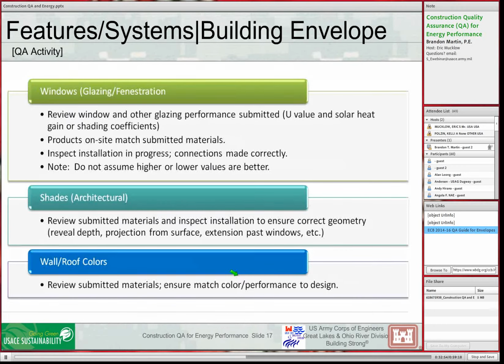We need to look at windows. Again, this is pretty much the same pattern. We look at what is submitted. Does it meet the performance requirements? Does what's on site match the materials that were submitted? Are the windows being connected to the walls properly?